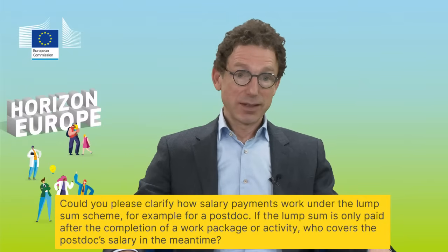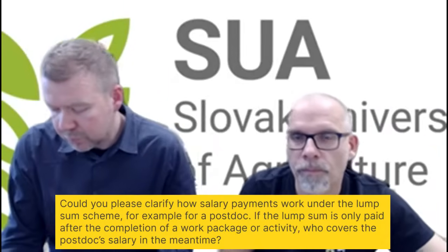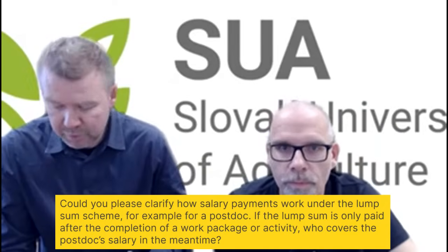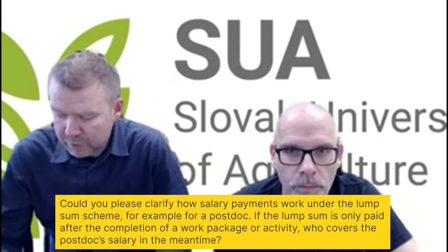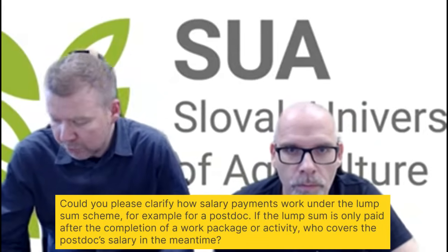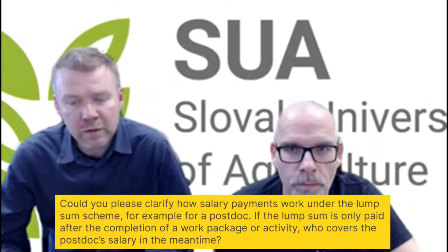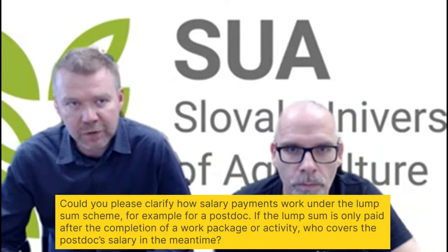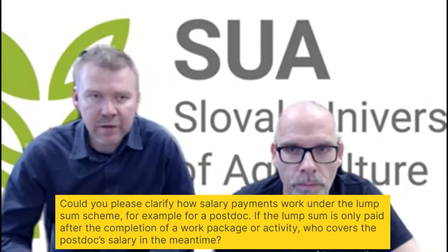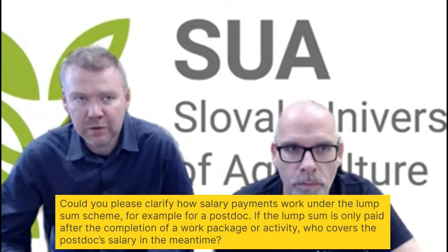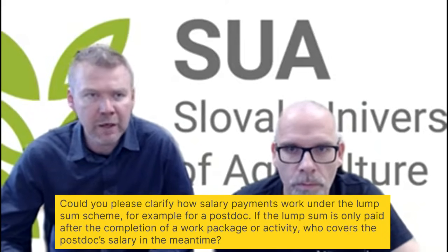Next. Maybe a little thing from our side to this. Our good practice, as in the consortium agreement, was that our pre-financing was 75% of the total grant amount, I think, which is quite a good portion of money, and it was divided into two installments. The first installment was 75% of the pre-financing at the very beginning of the project, in the first month, and then the 25% in installment 2 was provided in month number 9, I think.